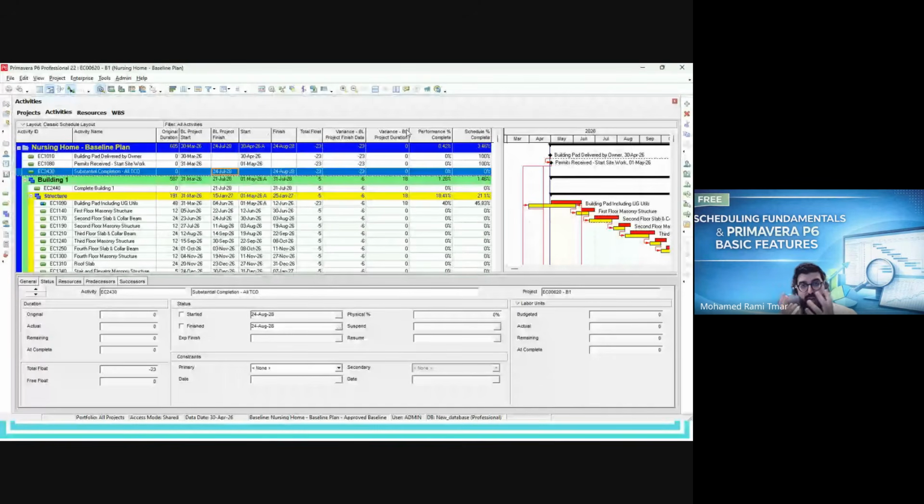And one smart team leader, instead of receiving a complaint from the sponsor and from the client that the progress is negative, he will start and prepone those activity. Even if it's in the future, he will start working, since he can create the work front.